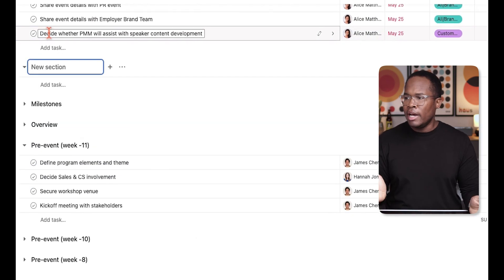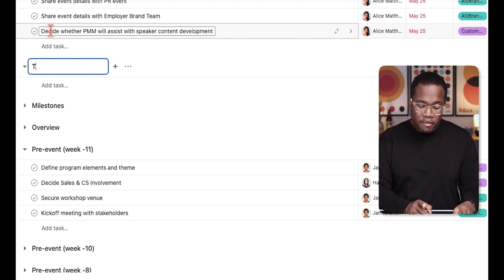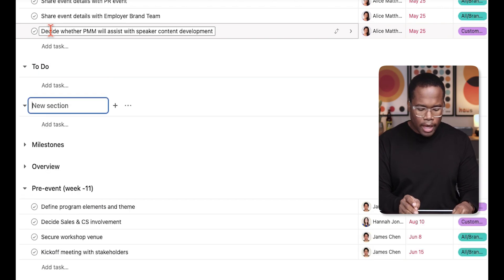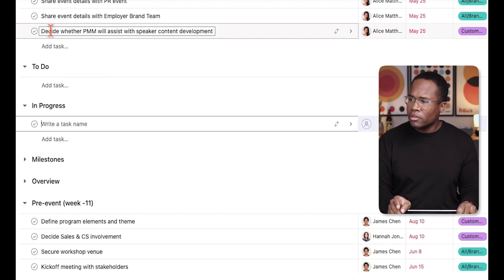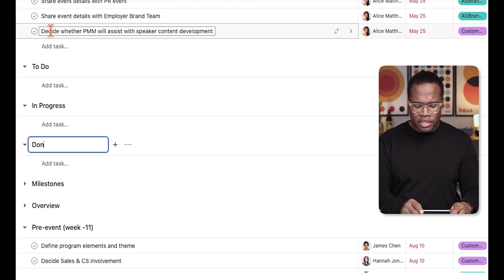If you're working on another type of project, you could have sections that are simply 'to-do,' 'in progress,' and 'done.' What's nice is you can apply rules and automation to each of these sections so tasks can automatically move through them. If you're using form submissions, you can have a form automatically submit into a specific section. Sections are really powerful in addition to allowing you to organize your different tasks.